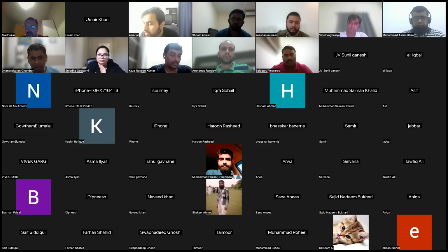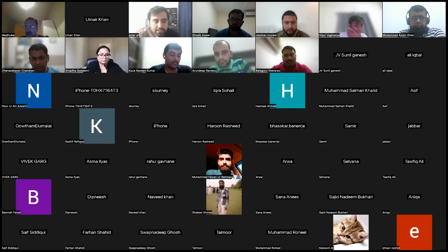Resource calendar only human? No, there are four types of resources: manpower, machinery, material, money. All four resources are put in the resource calendar.